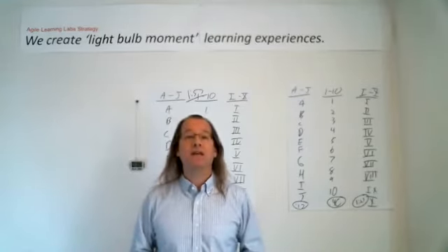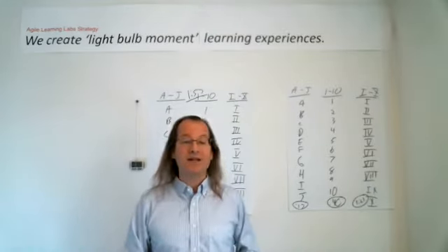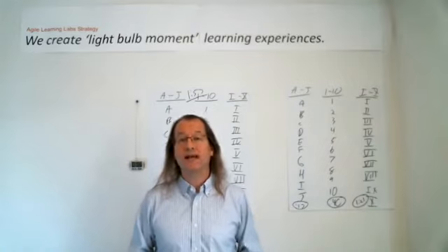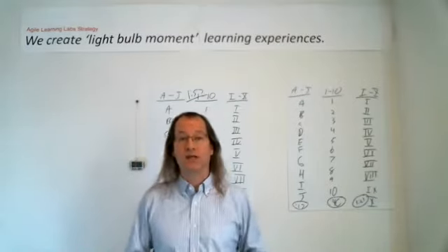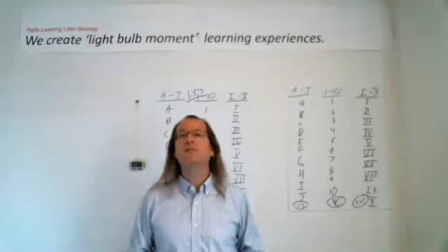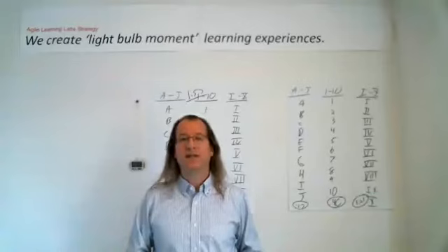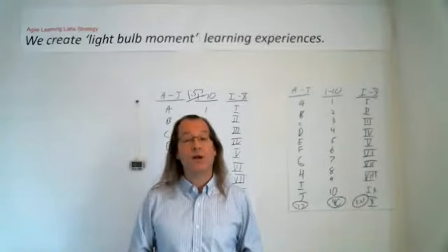So that's multitasking. This little exercise that I do, with or without the every 10-second report outs, this is the first time I tried that little bit, is something you can take back and do, right? So anytime somebody's asking you to work on this and this, and then they come in and they say, oh, we've got this super important thing, you better start on it right away, have them sit down and say, you know what, give me 2 minutes. Let's make 3 lists. And then tell me if you really think it's best that we should start on this right away. Or maybe in order to get everything done sooner, we actually should wait.